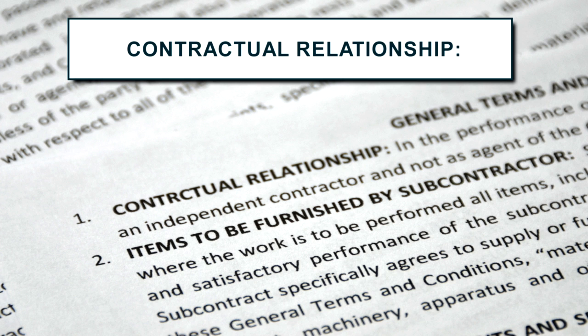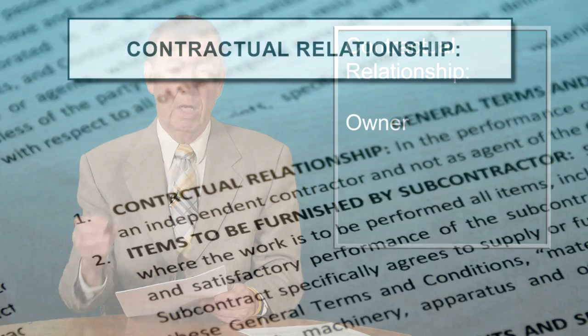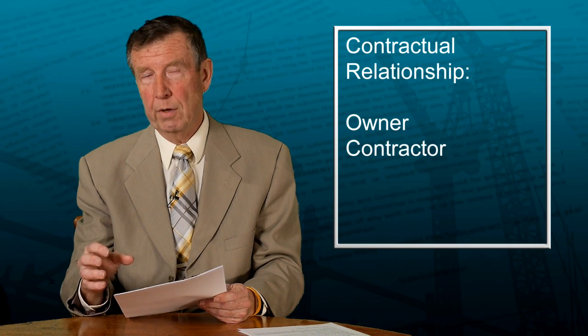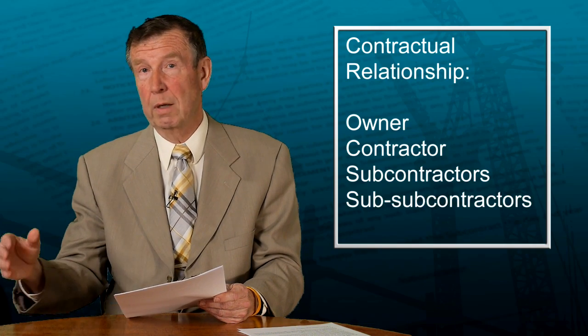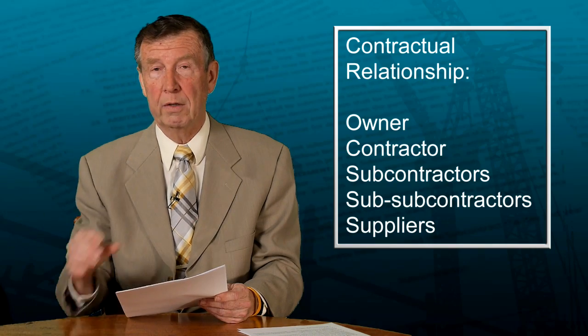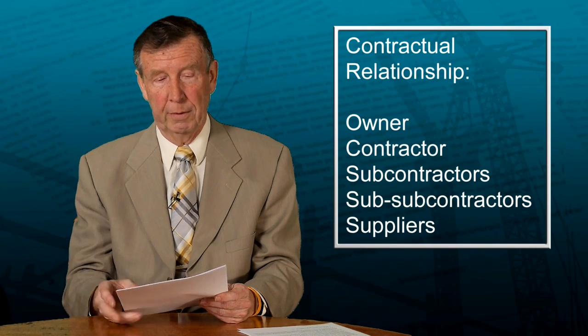The key here is you as a contract administrator want to make sure that you are not joining forces in some quasi-legal joint venture. There is an owner, there is a contractor, there are subcontractors and sub-subcontractors and even suppliers. They all need to be separate.